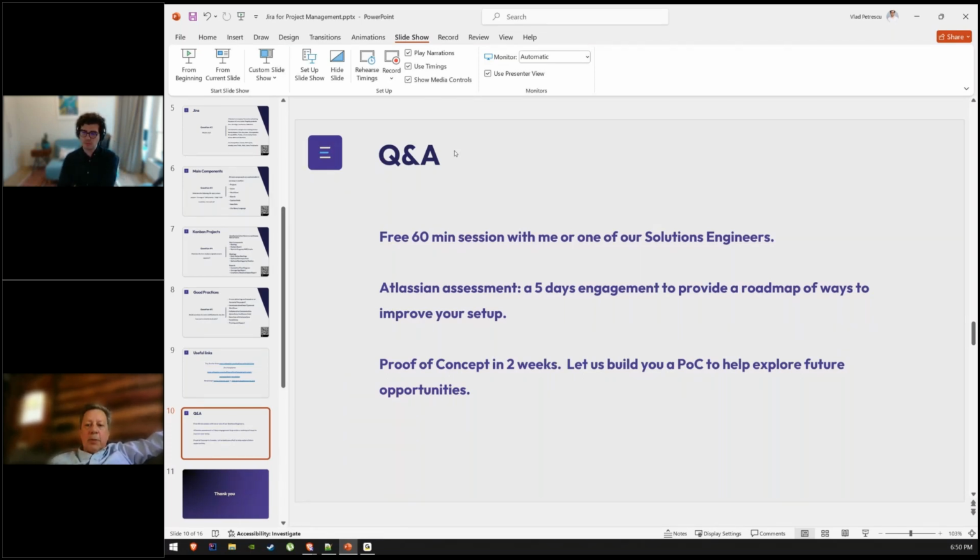Also, Michelle, related to that, if you don't want to use story points, you can actually use time as well. If that fits your scenario better, then absolutely you can use time instead of story points, and then measure against that as well. Any report can show information based on either story points or time. Atlassian is very flexible in this area. They recommend using story points because it relieves the pressure of time from the end users, but that's very subjective, and that's a very long conversation.